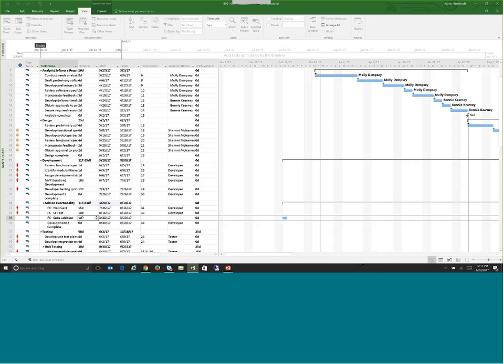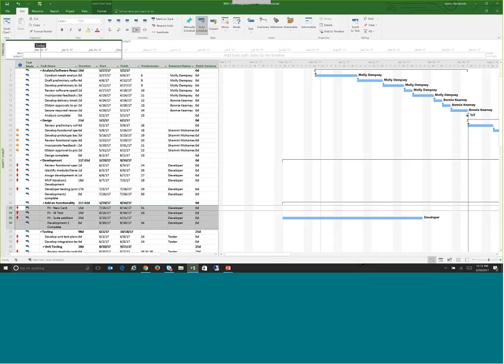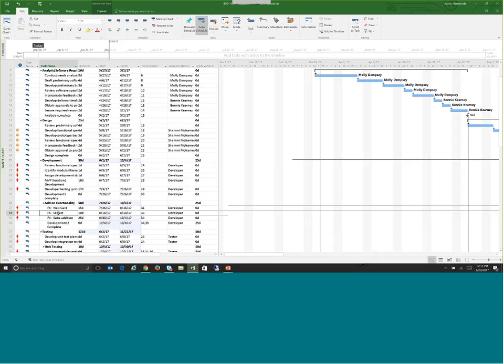Just give it a hypothetical name here, put a duration on that. We're going to assign it to, we don't know which specific developer yet, so I'm going to use a generic developer role. And I'm going to link it up with the tasks that are already in this section here. So it's going to follow up this SF test, it's going to follow up this Suite Edition, excuse me, is the new task I added. So what I have over here, I'm showing a column called Finish Variance.